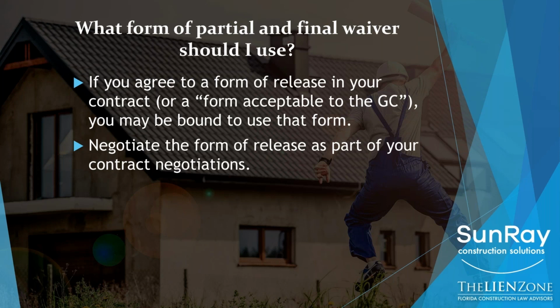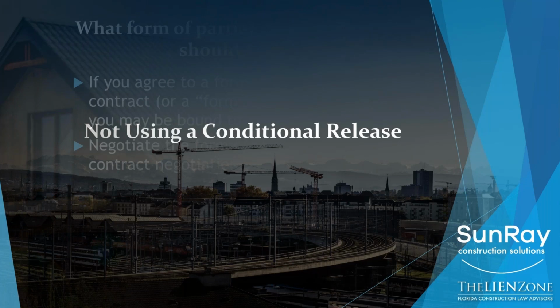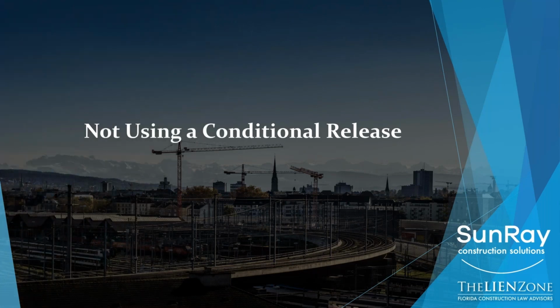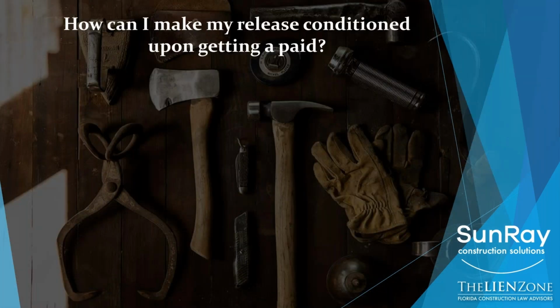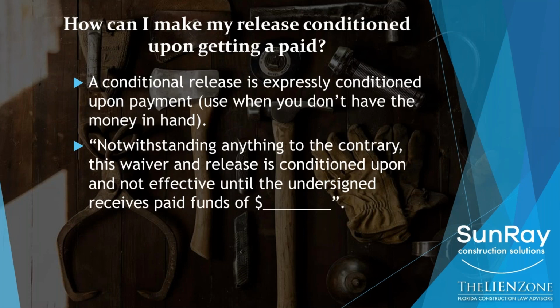Okay, trick number two: not using a conditional release form when you are giving a release and you don't have a check yet. So let's talk about what a conditional release is. It is a release on any form, but it has a condition, and that express condition is that it is not effective until you receive the payment that's recited in the document.